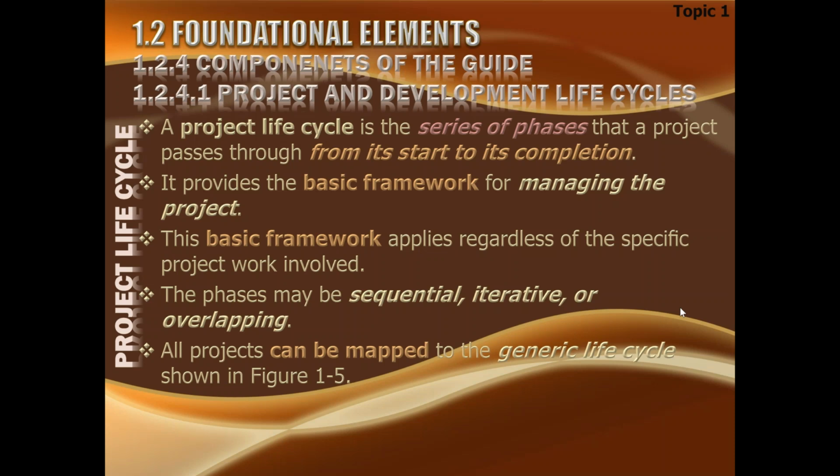Sir, right. Actually, you are right in saying that we will create a WBS, but I would rather say, yes, you are right. We can relate it to that. But if there is a need for a phase to be further explained, we can have sub-phases defined under certain phases. If there is a phase which needs further explanation, maybe phase 1 has 3 further phases. So we call them sub-phase 1, sub-phase 2, sub-phase 3. So if every phase can be divided into sub-phases, we can accommodate a huge number of phases.